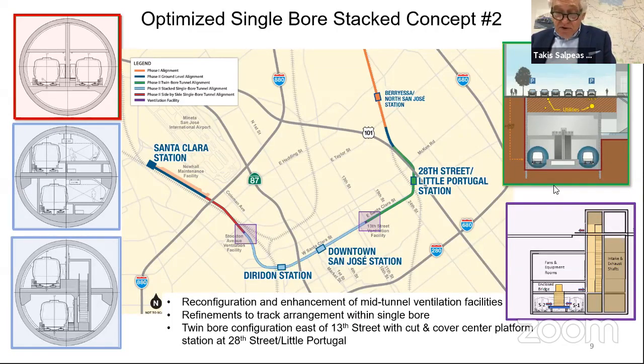We're gonna brief you when we have all this information. And yeah, we really debated, Director Morales, whether to use concept 2 in this discussion. Concept 1 serves us well and satisfies BART's concern. Why do we introduce concept 2 or optimization 2? For the reasons we just discussed. We need to compare it. We need to see what the competitiveness is in the market.